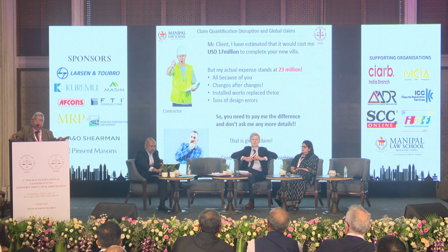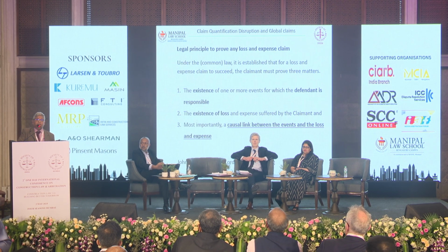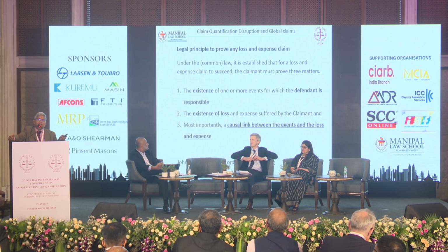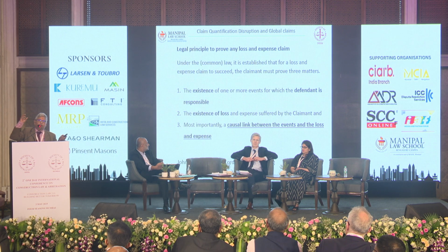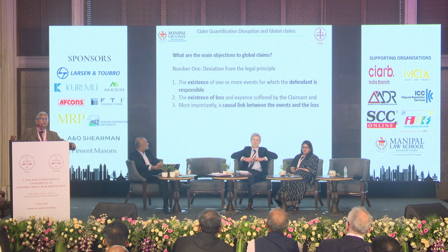He is telling that I am a good contractor, I am an experienced contractor, my estimates are fine, but you can come and verify, you can audit what is my final cost. The delta of that is going to be the claim you need to prove. This is not going to really work in the good old days, but there is a difference now, because there are 3 things for you to prove the claim. There was a cause and effect, there is an event that happened, and there is a cause of the event for which the employer is liable, and there is a causation nexus, we call it. There is a connectivity between what is the event that happened and why it happened. So this cause and effect nexus will not be proven in case of a disruption claim. So that's what it is. The third one is missing.